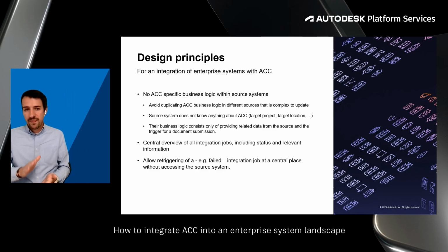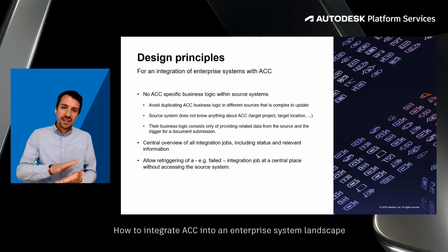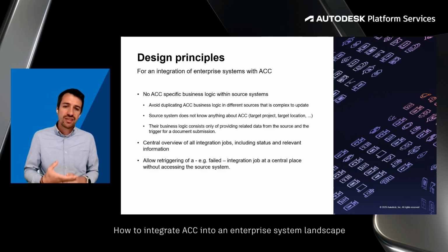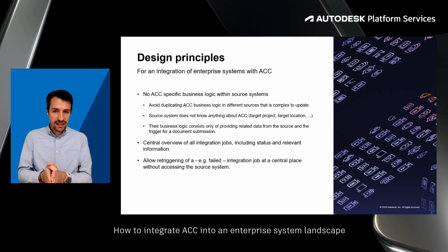What does this mean? A source system does not know anything about ACC projects, target project, target location where the document should go to. Their business logic consists only of providing related data from their source and the trigger for a document submission.